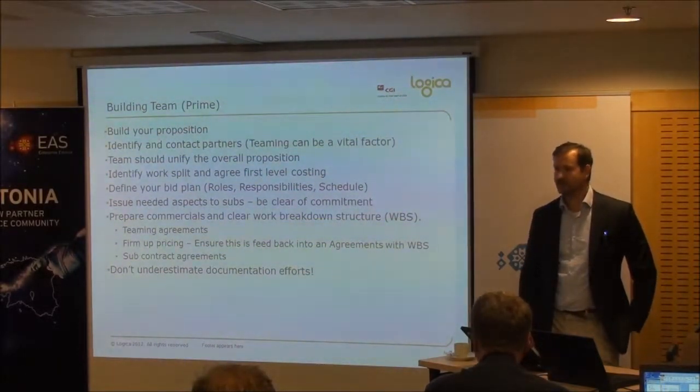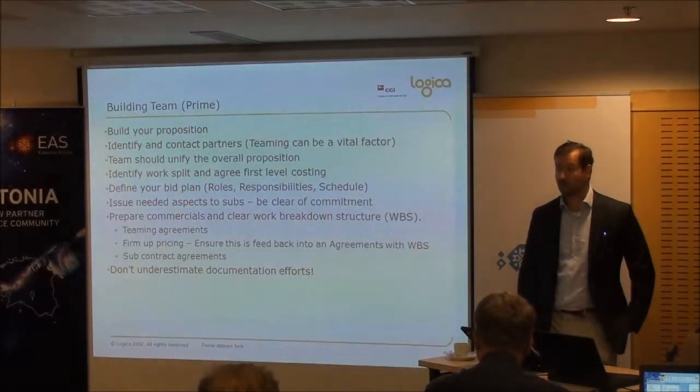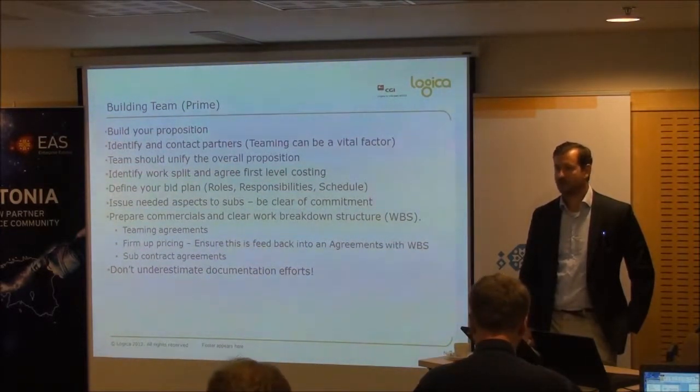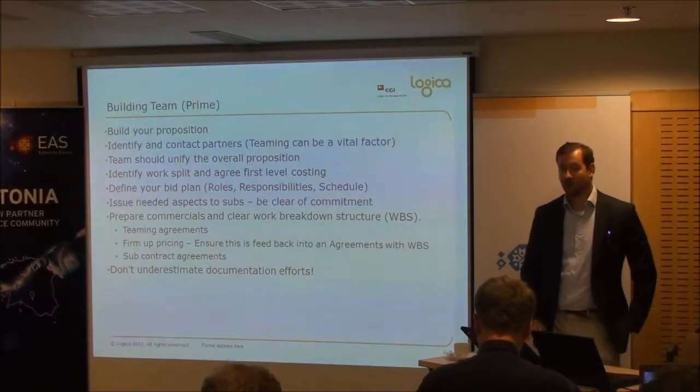Now, the first thing you need to start to do is to divide this work up. You need a very clear work breakdown between you and the subcontractor. You need to be very clear on what they're going to do, what you are going to do, what documents they own, what documents you own, and also the price. A fatal move is to leave this until you're a week from the end, because you've got no time.